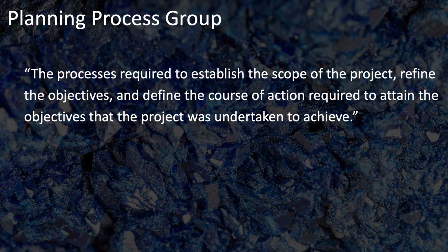In a traditional waterfall approach, the scope is defined up front. However, in an agile approach, the high-level scope may be established up front, but the details of the scope will be progressively elaborated during the execution of the project. Notice this term, progressive elaboration, which means to elaborate on the details of the scope throughout the project lifecycle.